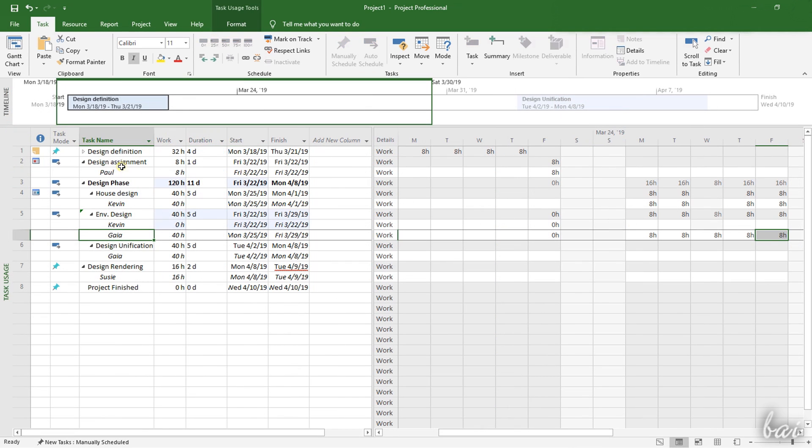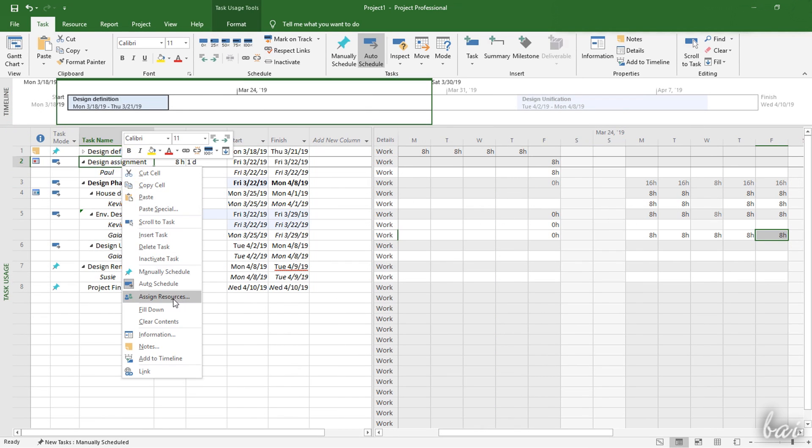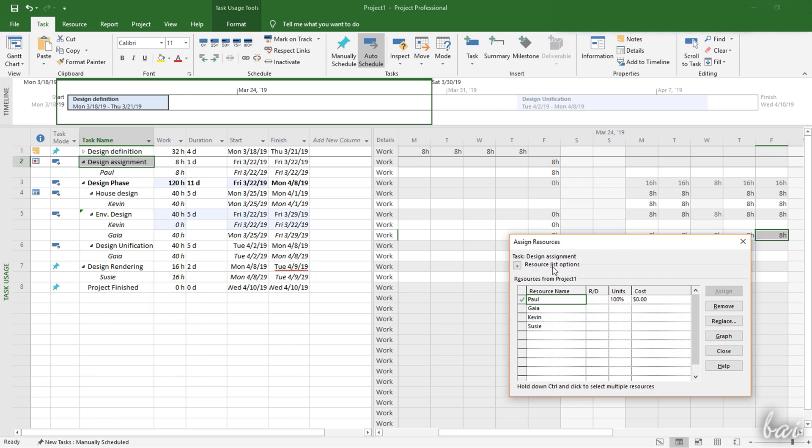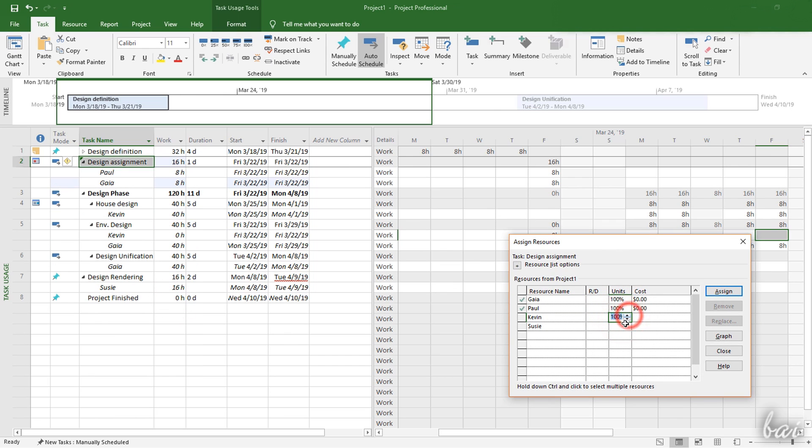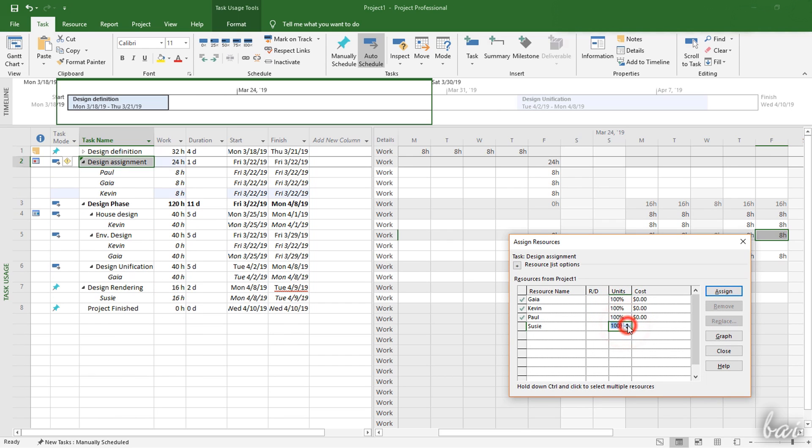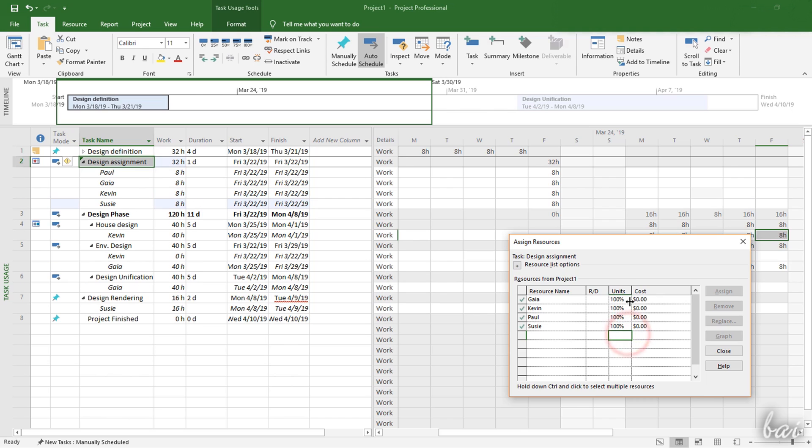You can assign resources to task also on the Task Usage workspace by right-clicking on any task and then going to assign resources.